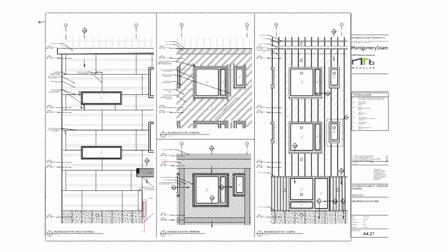This is some of the wall build-up drawings that we set up from the start. We put these together to help with the process of educating the modular builder and the trades about the order of building.